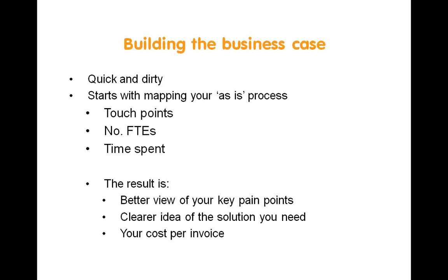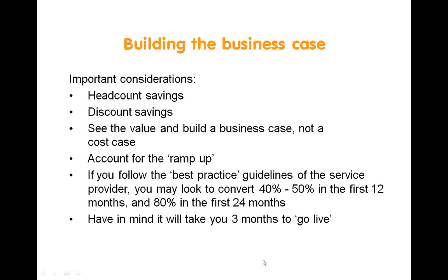Importantly, I think it's key to note when you are mapping out your as-is process, not just to focus on the AP piece, but to map out your process end to end and include the procurement piece in that as well. So in terms of building the business case, important considerations, of course, are the headcount savings that you're looking to have. And that will have an impact, obviously, on the business case quite considerably.